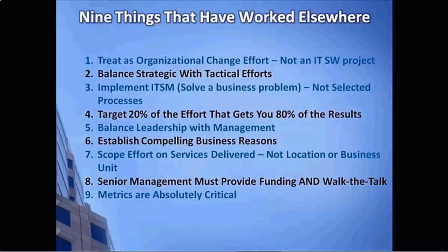If you have absolutely no change management capability in-house, for example, put in the most important pieces first and get some value from them before you design the rest and build the rest of the process. So for example, with your change management solution, if you had absolutely nothing, probably simply logging and reporting on changes will provide a tremendous amount of benefit right off the bat. Whether you actually implement a CAB and you do a better job of analysis and maybe impact analysis, those things are certainly important for a very good change management process.